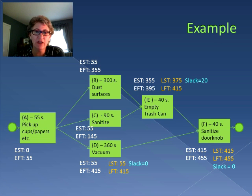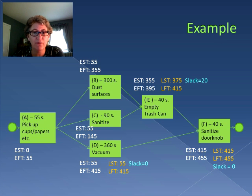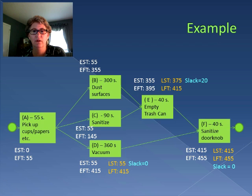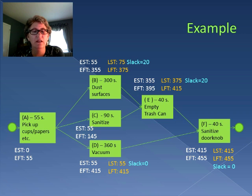Let's take a look at Activity D. Activity D must be finished by 415, because that's the latest Activity F can start. We subtract out the 360 seconds of time for D and find that our latest start is 55. There's no difference between the late start and the early start, so we have a slack of zero. For Activity B, it has to be done by 375, because that's the latest Activity E can start. Notice the latest start time of the activity that follows it is the latest finish time for that activity. So the latest finish time is 375 — we subtract out 300 for the activity time, giving a late start time of 75, and a slack of 20.